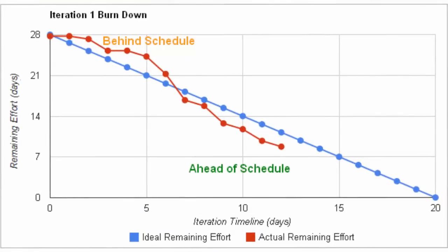Now the burn-down chart is updated for the sprint. The burn-down chart displays the remaining effort for a given period of time. Generally speaking, the burn-down chart should consist of an X-axis to display working days, a Y-axis to display remaining effort, ideal effort as a guideline, and the real progress of effort. Even though Scrum does not enforce it, the development team is best suited to update the burn-down chart.